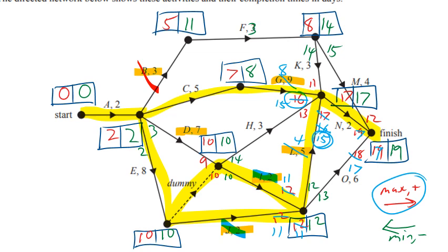So a lot of people got this wrong because they didn't spot this. I'm running out of colors. This is how crazy these diagrams are. I'm running out of colors to highlight. They didn't spot this thing, all right? That was spotted because you put these little red numbers coming in, these little red numbers here, they really helped you. So make sure you do those sort of things, and seeing that, you've got to do your forward pass again and go, oh, wait, there's a 16. So I had to reduce 4 activities. That's 4 lots of $1,000.